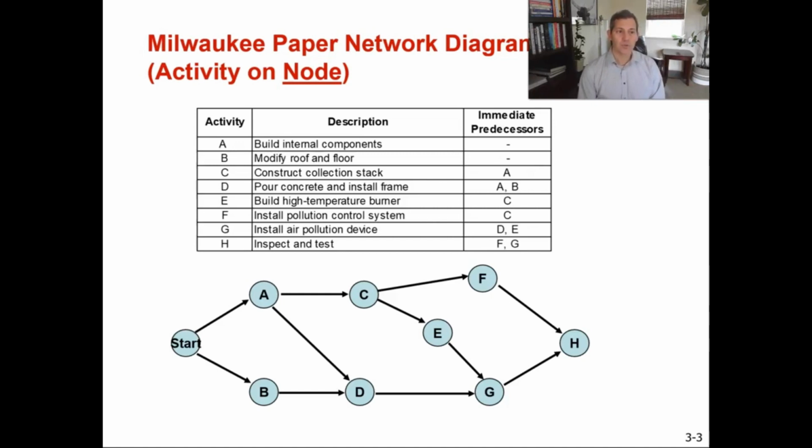If there are ever 2 starting points, like there is in this example, I would write start. I would make it its own activity. I like to have 1 start and 1 finish. So even if there are multiple starts and multiple finishes, you can do your own start and your own finish. That will be easier to understand, what my first activities are, what my final activity is, and how long the project's going to take. I highly recommend you always make 1 solo finish node.